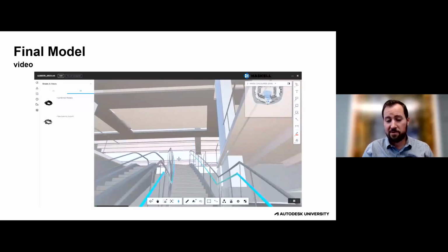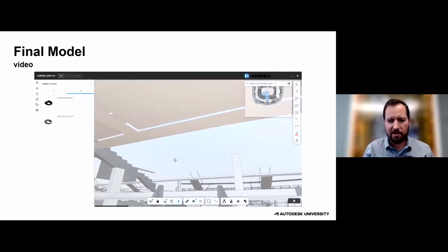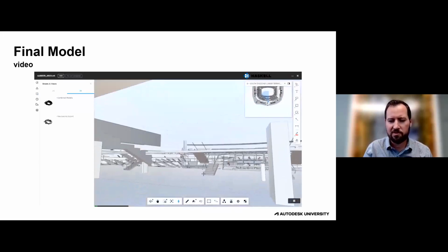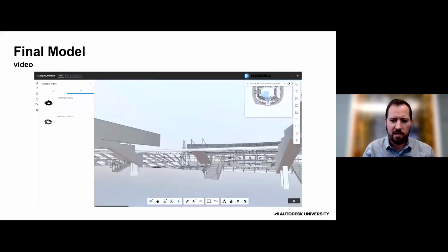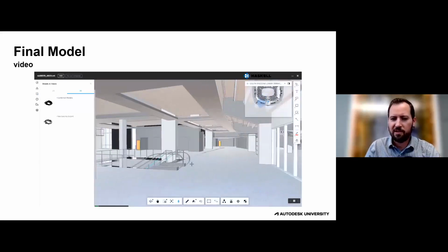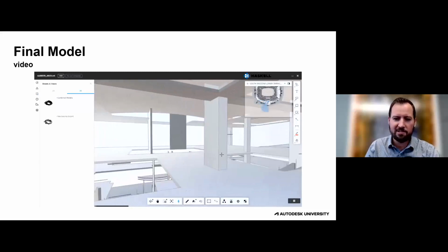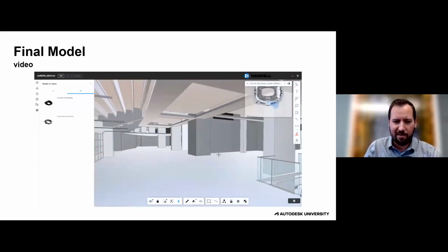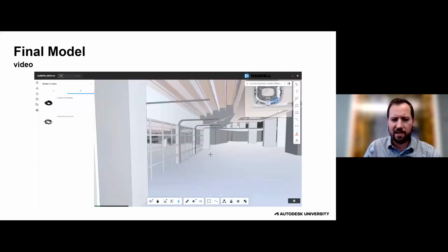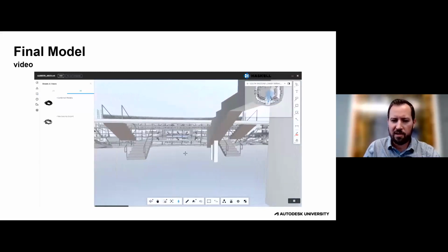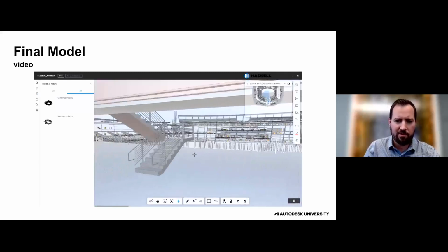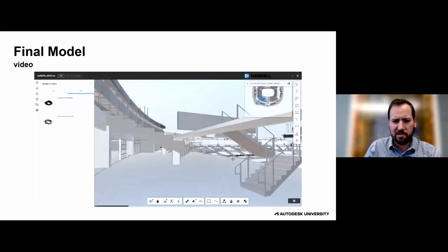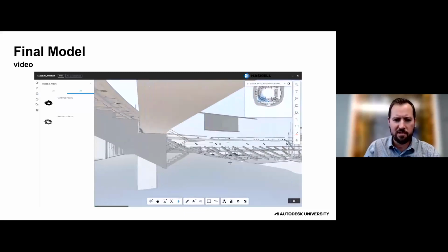Stairs in particular were a huge modeling time investment on this one. There were maybe close to 100 stairs. We had one of the 13 team members modeling do nothing but model stairs continuously for 12 weeks straight. So really a lot to accomplish in a pretty short amount of time, and really a great job all around by the modeling team here, and the finished product that we were able to turn over and showcase here, that you're seeing some snippets of in BIM 360.